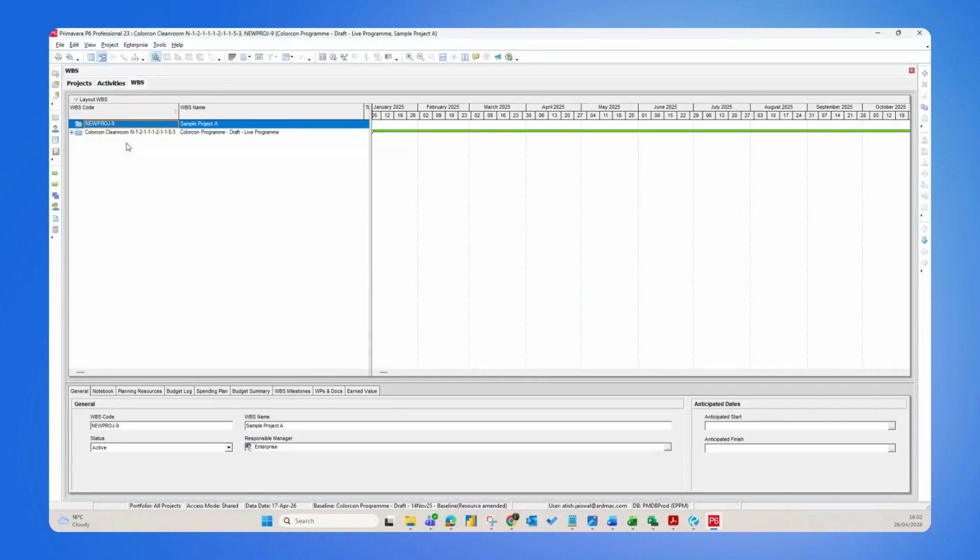When you have to divide a big task into smaller versions, let's say you have a big task of building a house. To build a house, you need to have several activities, like you need to build a wall, you need to do the ceiling, you need to do the lighting, then the flooring, then you have to put in the furniture, and you have to do the finishing and everything. So the one WBS is the construction of a house, and the activities under that WBS are called the sub activities. So basically, you can divide any project into multiple WBS. That depends on your project. So this is one of the examples.